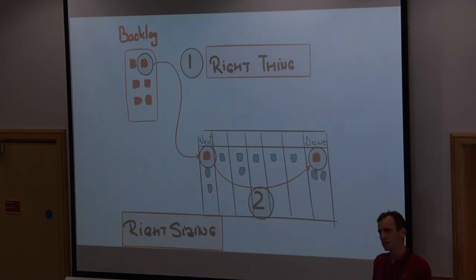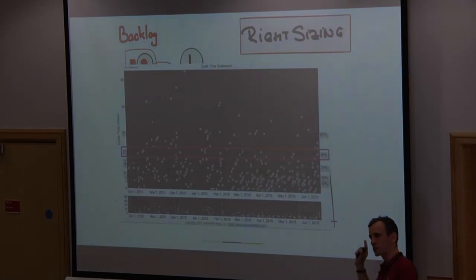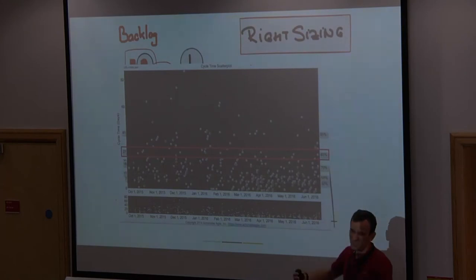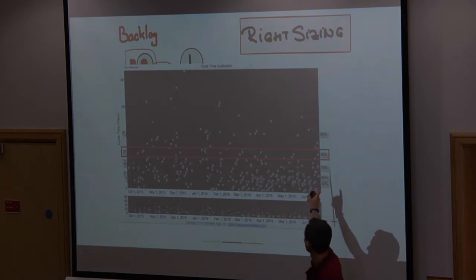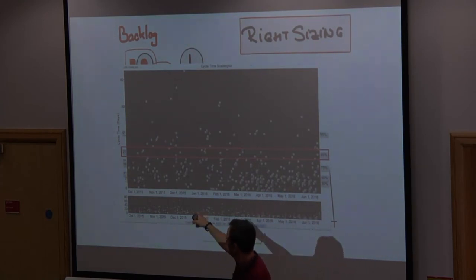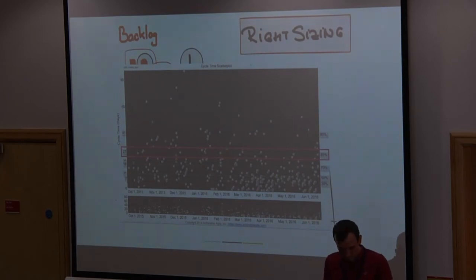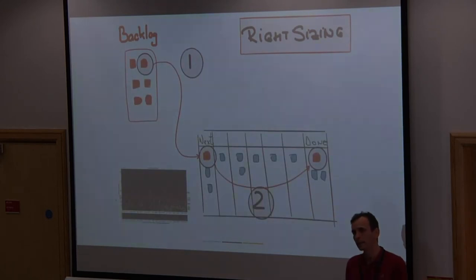And the second is about the right sizing. And this is the right sizing question, is the SLA that we are taking for clients, a product owner, saying that we commit to bring this item in, to complete this item in a given SLA. And the way we take the SLA comes from scatter plot. So again, we show the data. So we go into the planning session with the data. We look at the product owner and say, okay, what confidence level do you want to give for this item? And look, holding my hand. If you're a gambler, you can do 50-50, you can take 50% confidence level, but 85 is typically a good confidence level for one item. And what we do is, then we look at 85 confidence percentile and we said, okay, for this period in the past, it took 27 days or less to complete.